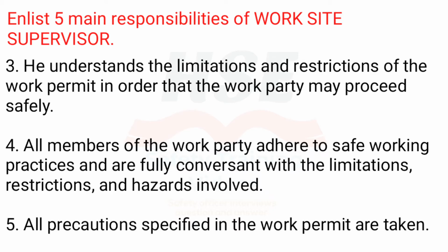He understands the limitations and restrictions of the work permit so that the work party may proceed safely. 4. All members of the work party adhere to safe working practices and are fully conversant with the limitations, restrictions, and hazards involved. 5. All precautions specified in the work permit are taken.